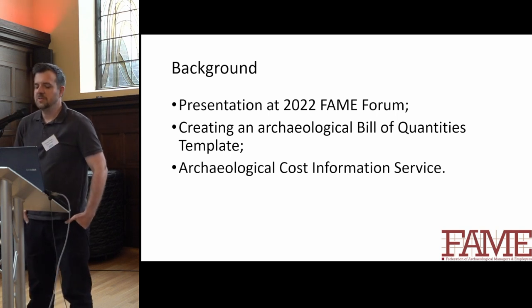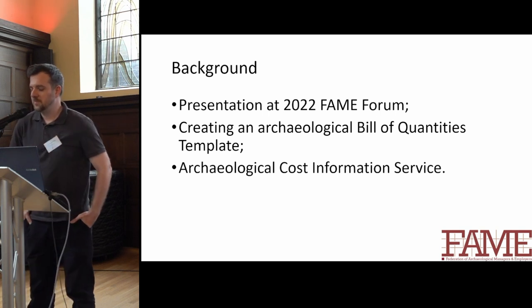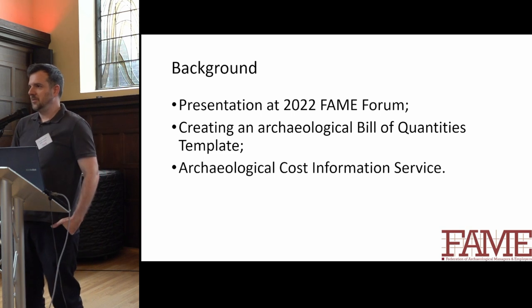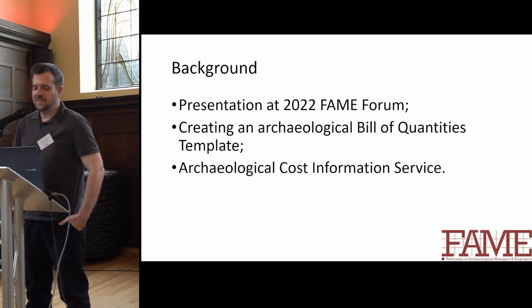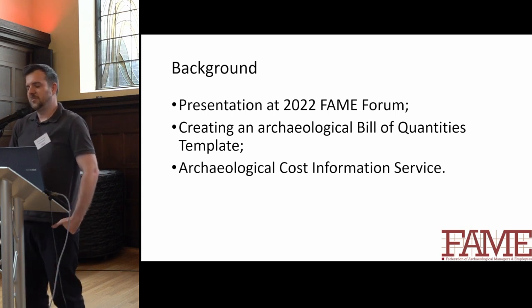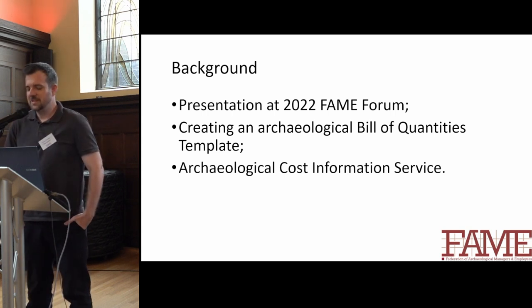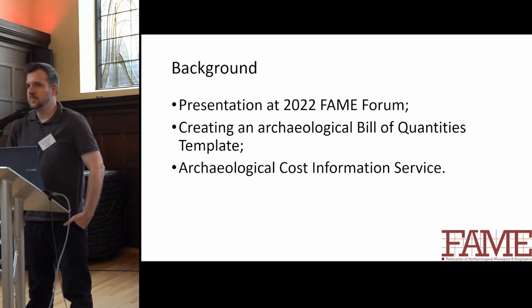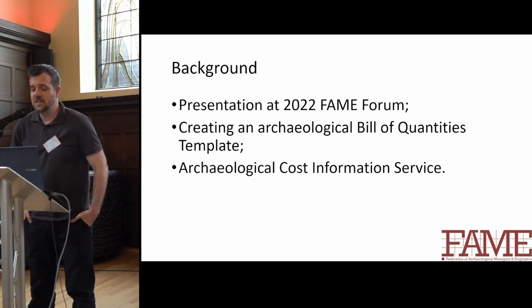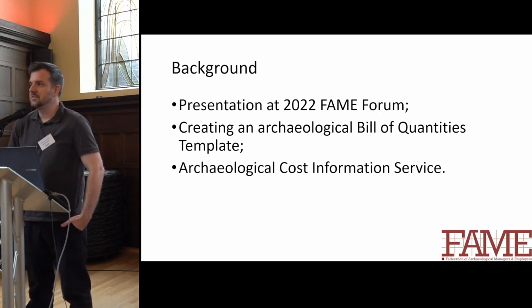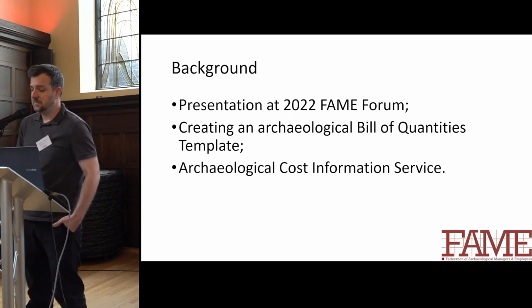So people could look up and say, this bag of nails costs 39p, this stainless steel doorknob costs this much versus one that is maybe brass. And it's used by quantity surveyors to essentially price out their projects ahead of time and to work with their clients and say, if you make this change, this is how much it's going to cost.